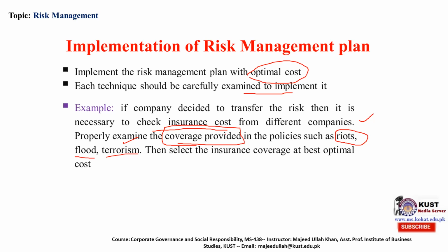If all these things are covered but a company costs you less, you should go for that company. But be aware whether the company is in a position to honor your claim or not. If the company is a new one and not backed by any strong group or other strong companies, you should be aware that it may have a problem in honoring your claim in case of any mishap.